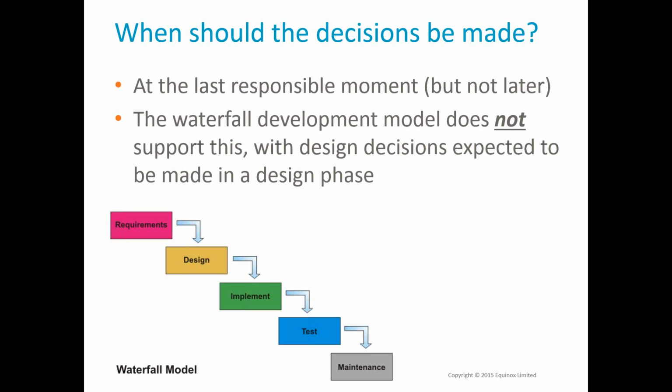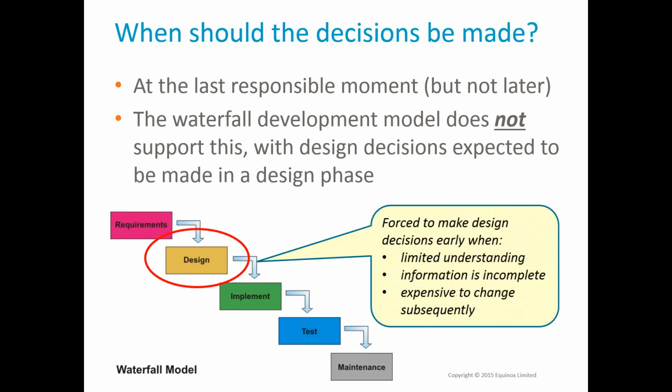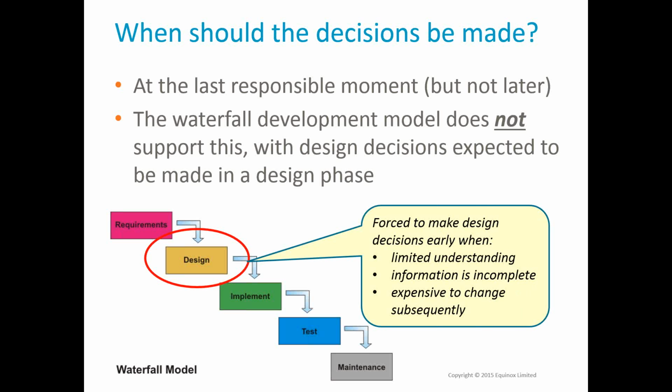This concept is basically delaying decisions until you know more, you've got a better picture, you have better information available, i.e. the last responsible moment. Waterfall forces you to make these decisions in this particular stage, in design. But a hell of a lot is normally going to be learnt during implementation and test, which will impact those design decisions. So really, as an approach, waterfall does not support making decisions at the last responsible moment.